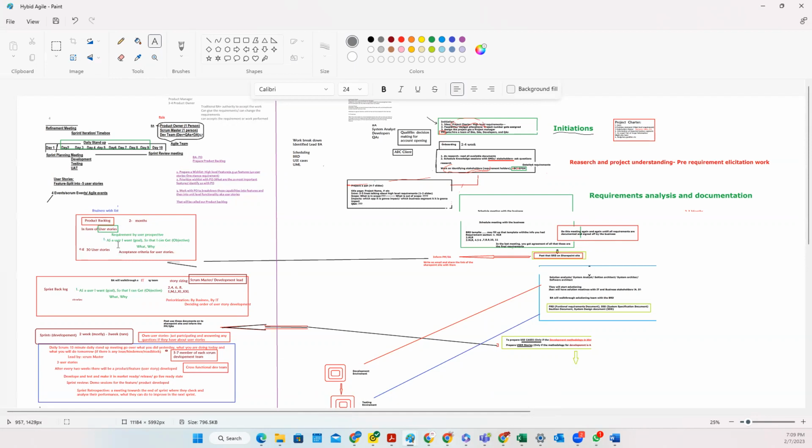How you detail it is you start documenting the acceptance criteria for that user story. You just ask the question, on what basis will you verify that you got what you want, and they will say, okay, I want to see these two things. So acceptance criteria come in with that. All those points that need to be verified, that the product owner got what they wanted, would be in the acceptance criteria of that user story.